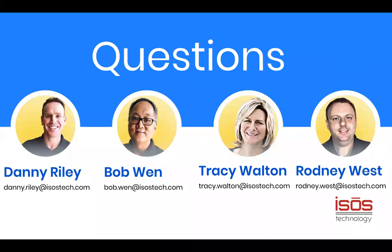And I would also recommend doing a WSJF calculation. So in the recalculation, obviously the job size is smaller because you've actually delivered on some of the work, but you really need to see if the cost of delay is still there. And that's where it's going to compete with other features in the program backlog and their WSJF values. And so it could get pushed to the next PI, or it could just stay in the program backlog as features with higher WSJF values move on to the next PI.